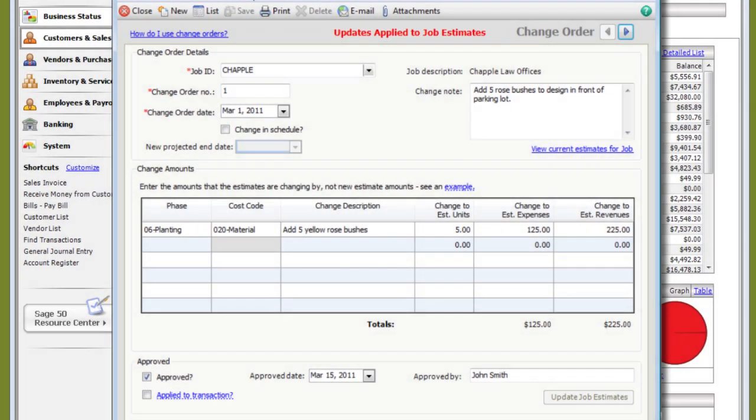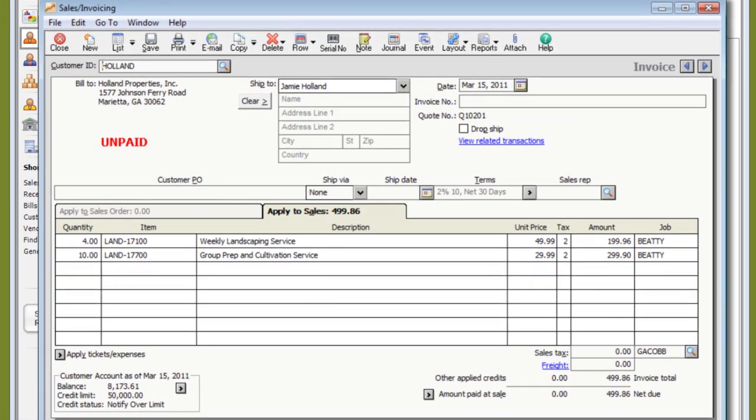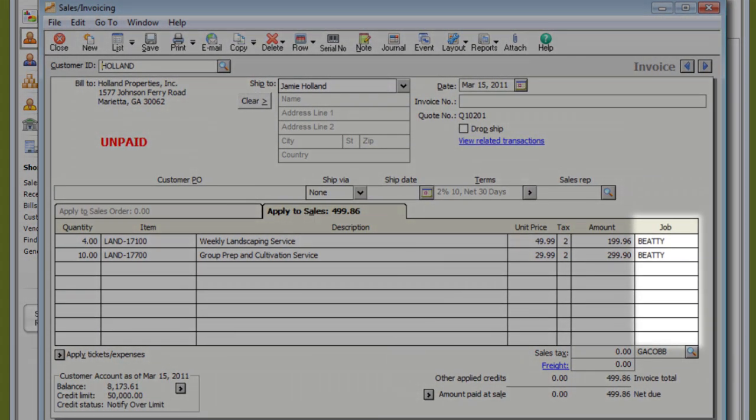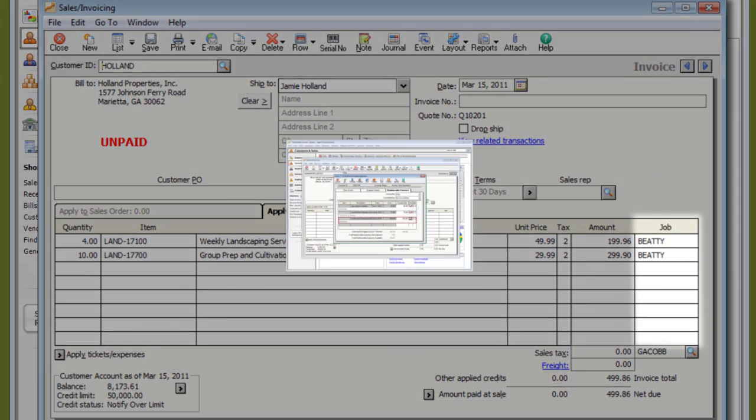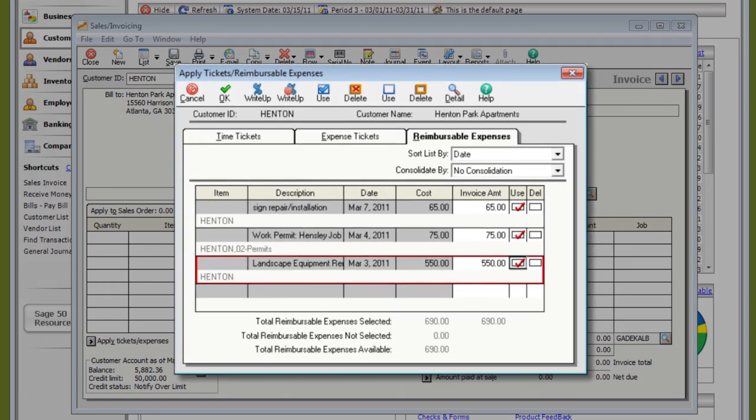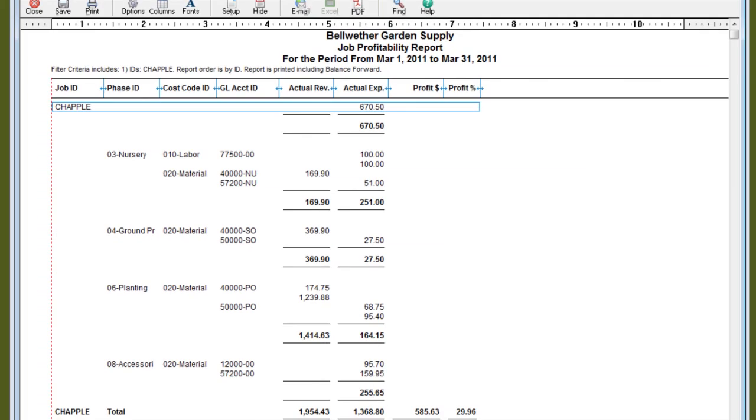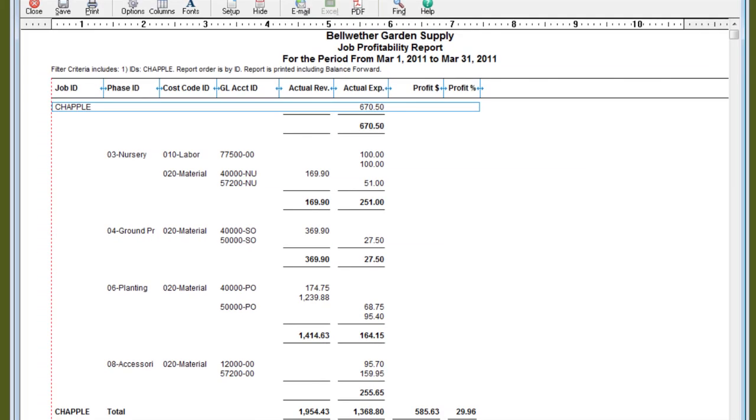And if I want to collect some of that revenue for a job? You can assign a customer invoice or receipt directly to a job or phase. Or you can use the Apply Time and Expense feature to generate invoices based on any unbilled time tickets or reimbursable expenses. Then use the Job Profitability Report to keep an eye on profits.